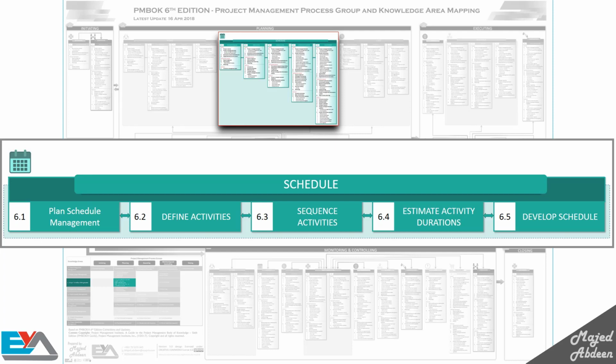Based on our website example, you have to produce 100 pages with many different services. So, for instance, the pages of the website are work packages. Here, the activities are the tasks you will do to create these pages. You will need to design each page. This is an activity. Creating code, it's an activity. Design the database, and so on. All these are activities. Remember, we perform this process throughout the project.